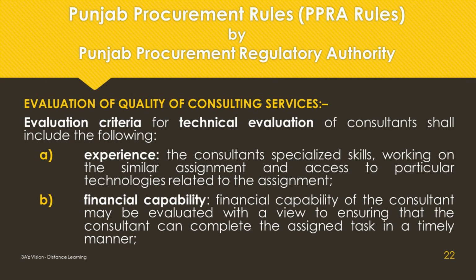Evaluation of quality of consulting services. Evaluation criteria for technical evaluation of consultants shall include the following. Experience: the consultant's specialized skills, working on similar assignments, and access to particular technologies related to the assignment. Financial capability: financial capability of the consultant may be evaluated with a view to ensuring that the consultant can complete the assigned task in a timely manner.